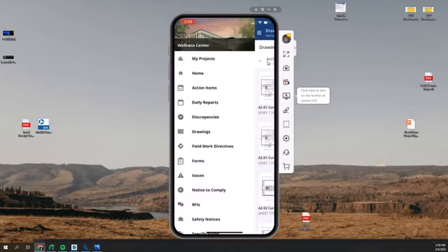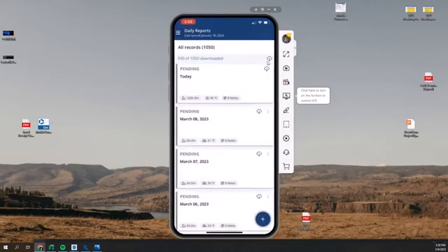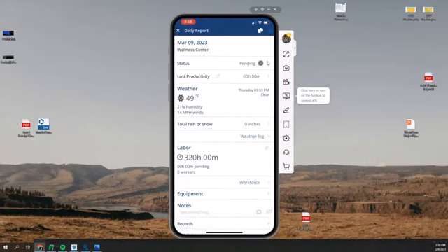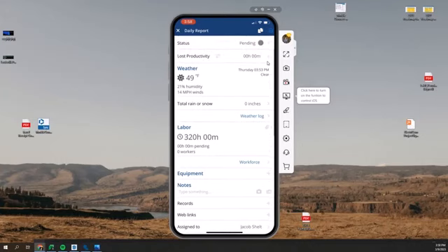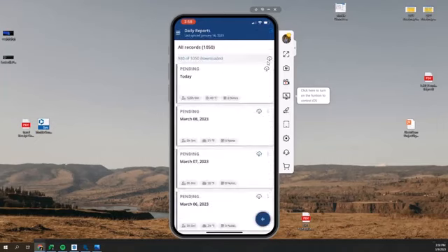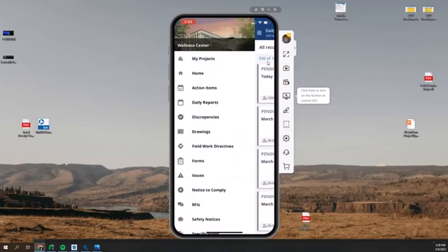Let's say you had a daily report that you wanted to do. Very easy daily report function. Weather, labor, right? Very easy way to get any labor in here, whether you're a subcontractor or a GC, keeping account of your own folks on the job, keeping account of sub trades on the job, right? You could have this CC to any sort of owner group or an architect or a GC to have their awareness of it, where they could just see that PDF, right? No need for anybody external to go into ProjectSight to interact with it. They can simply see it from the PDF email notification that they're going to receive, right? A lot of value there, right?